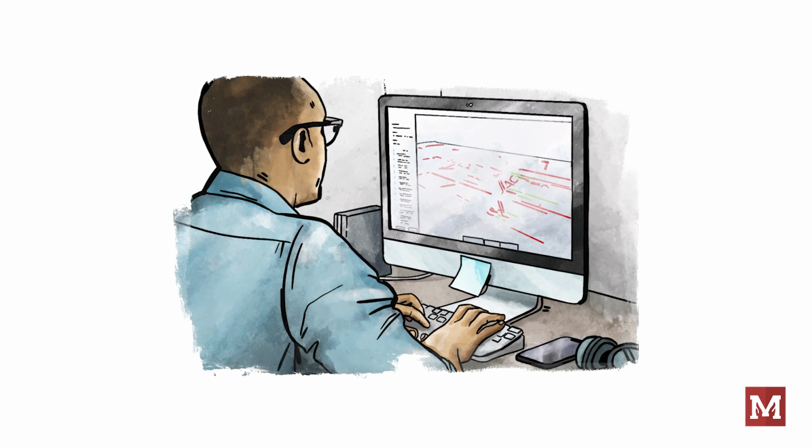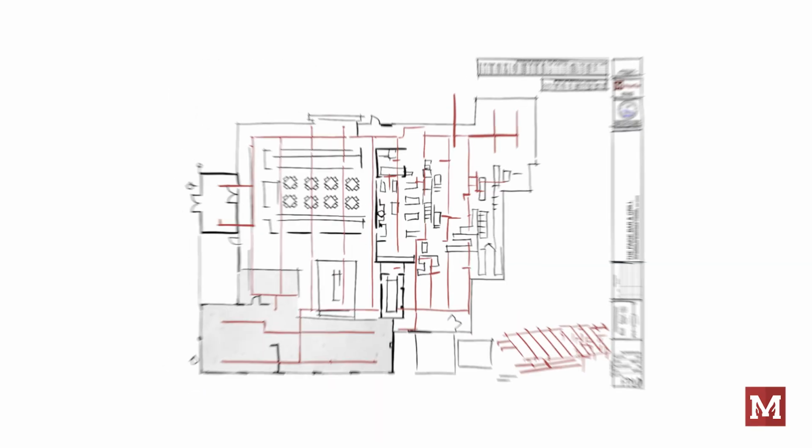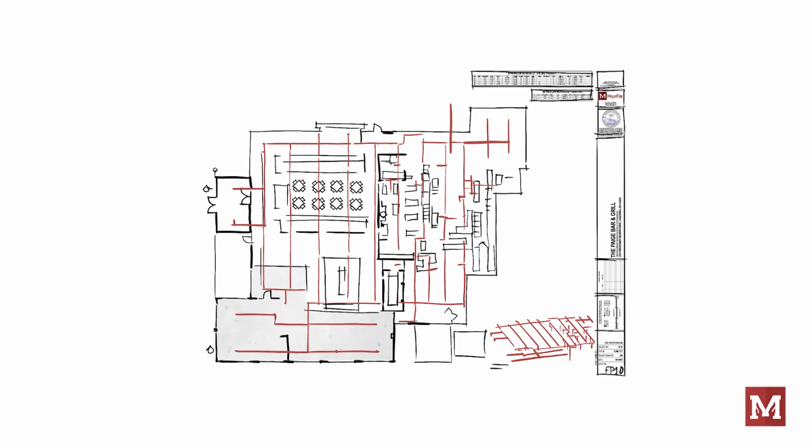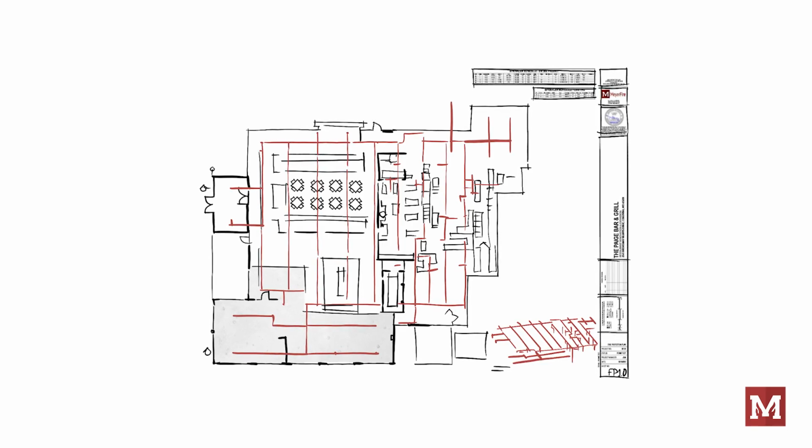So if the actual work is much more than the contractor priced, they're going to submit a change order for the actual work. They're right to do so since the original scope was not clearly defined. Another example: the plans show new sprinkler piping, but don't mention any demolition or removal of existing piping. It may be implied, but if demolition is listed nowhere in the documents, then it's not really the contractor's scope of work and not their responsibility.